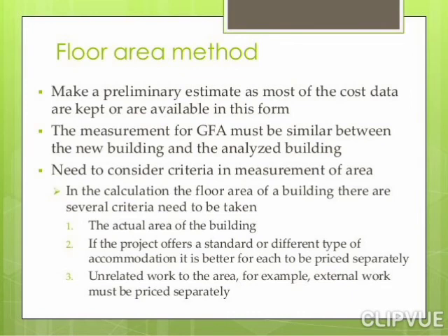Floor area method. We have to make a preliminary estimate, as most of the cost data are kept or available in this form. The measurement for GFA must be similar between the new building and the analyzed building. We need to consider criteria in the measurement of area.